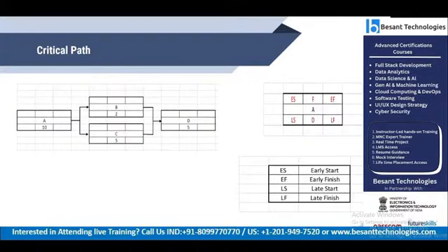From this definition, we have the term activities. The project starts on day 1, so technically we can say activity A starts on day 1. What is the early start value of activity A? Day 1. So we can map the value as 1 here, right? Yes. So we have a formula for early finish.